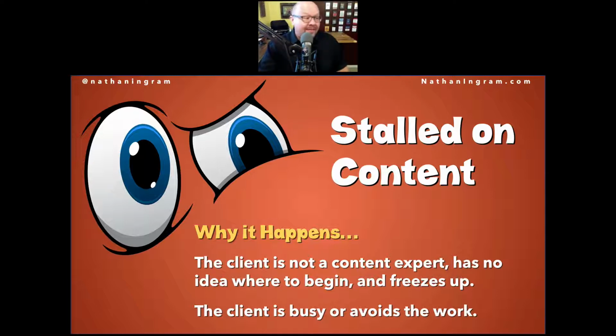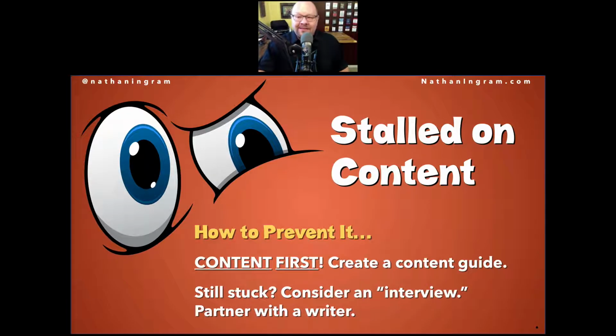How do you prevent a client being stalled on content? Let me offer a couple of different suggestions. First of all, you may have heard me talk about this topic before, but when it comes to content with websites, I adopt what I call a content-first strategy. That means that before we do anything at all on the website, before we even start replicating the WordPress site from our starter site into the site we're going to build for the client, before we do any design, the client has to give us all the content 100% before we can take the next step forward.